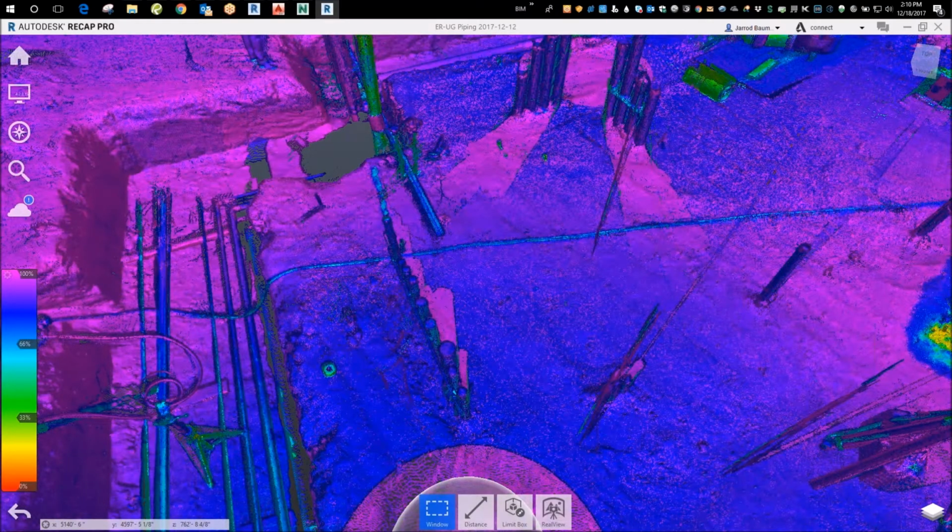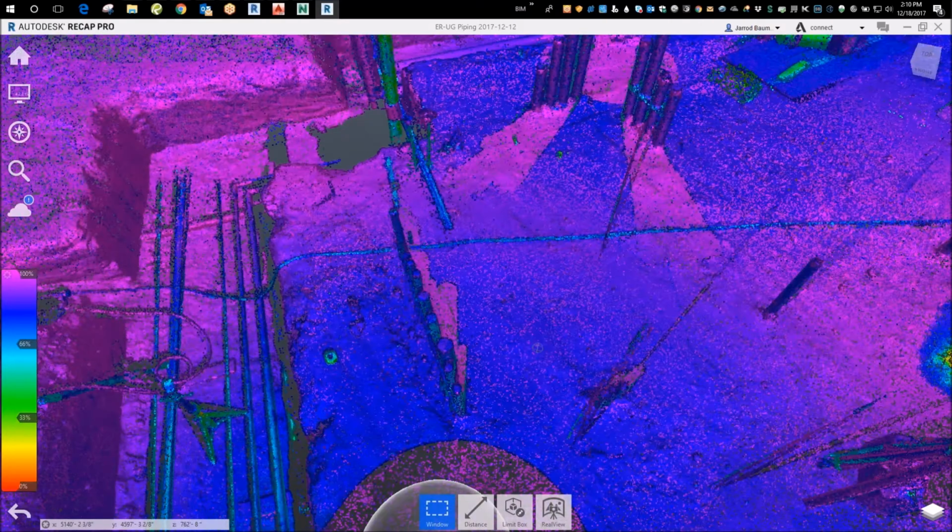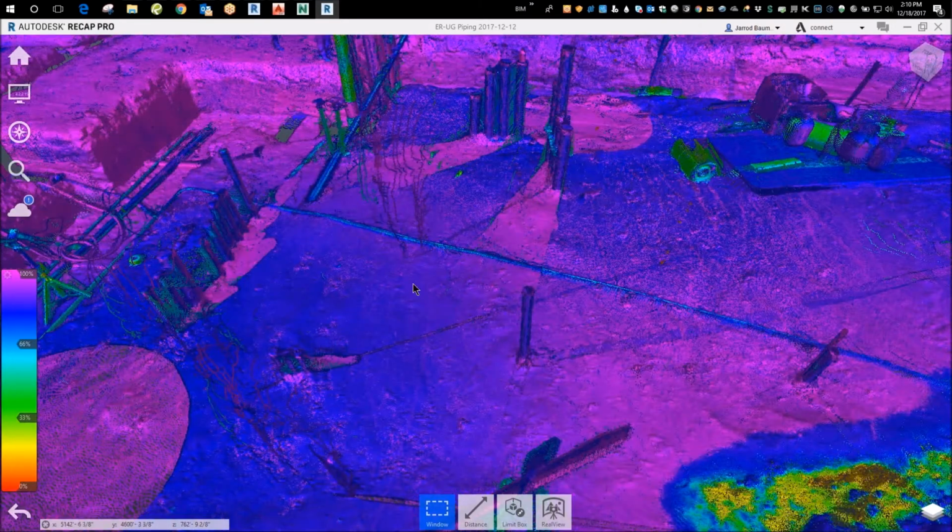Well, how much? Now the surveyor's paying for these guys to come back and fix it. Some of it's encased. A lot of it isn't, but he's now paying for this change order because these guys were done and we should have been moving on. Now we're losing time. So how much does he move? Now they're all leery of using the grid lines, even though we made them reset them. We checked them. They're good now.